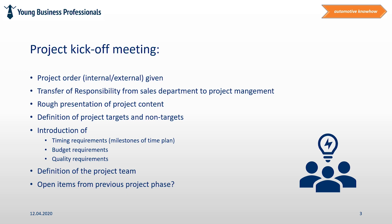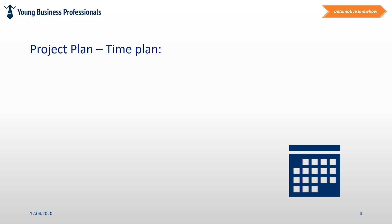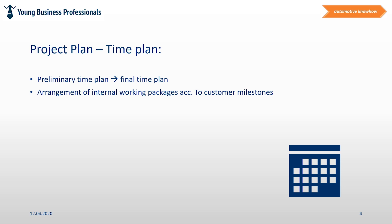The majority of the activities is related to the project manager — project planning and time plan. He starts to transform the drafted time plan that was already created in Phase 0 into a more detailed one, considering all internal working packages aligned according to internal and customer milestones. All important project milestones such as the design freeze, first off-tool parts availability, PPAP, and start of production should be considered.